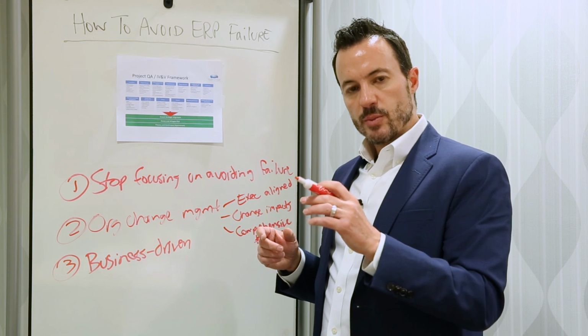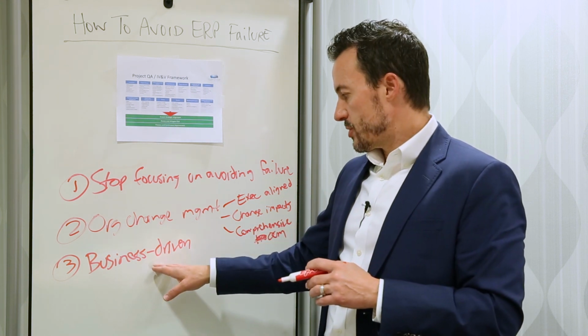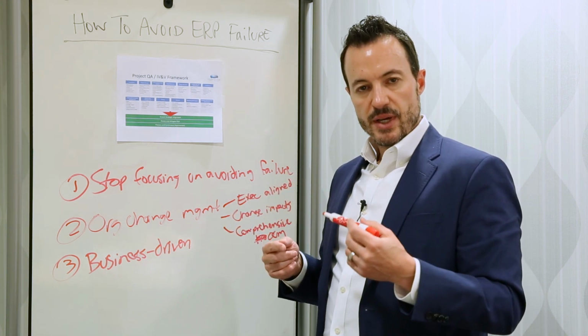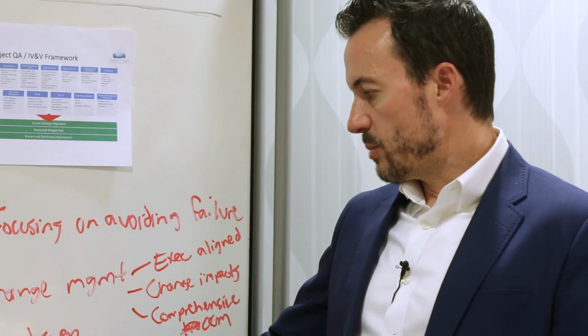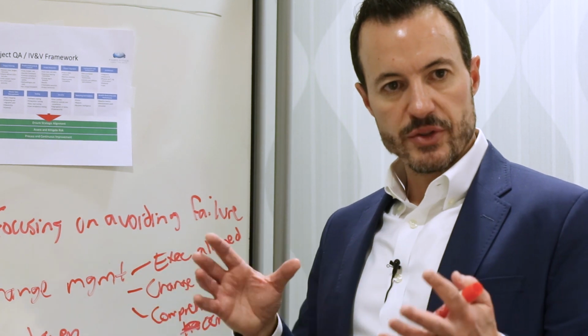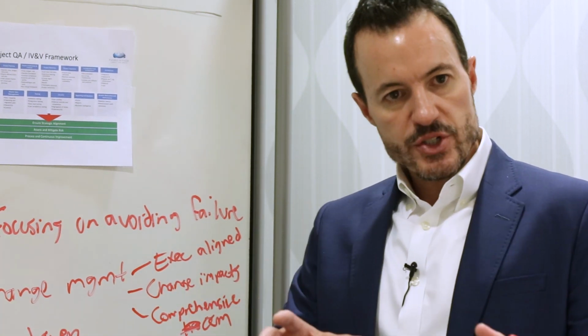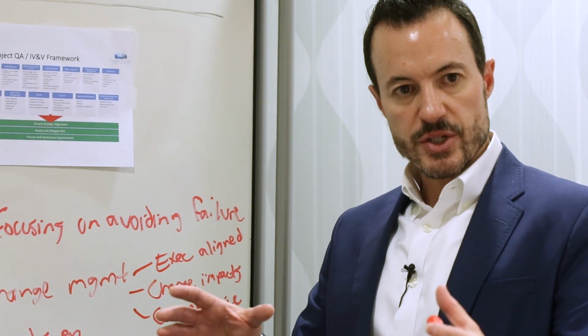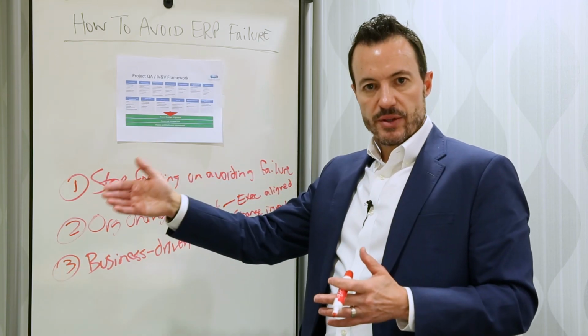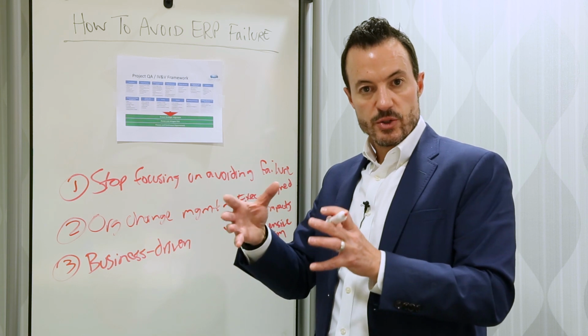And it's also important to note that this type of approach requires more preparation up front. So in theory or on paper, it may seem like we're slowing down by spending more time getting alignment on what we want this project to be, what we want our organization and our operations to look like going forward, so that we can define the blueprint for the transformation. But that will save a lot of time later on that far exceeds the amount of time we had to spend doing that up front.